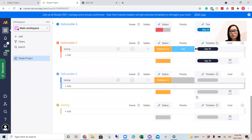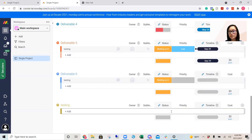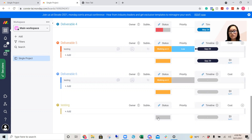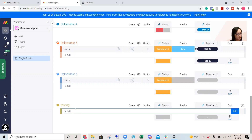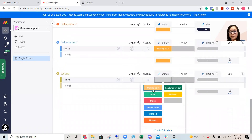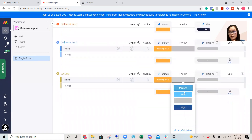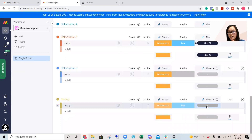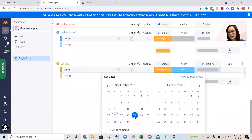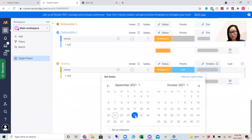So if you were to go to 'testing', for example, you need to put in the activity. Once this bar comes up, you can set its status — stuck, done, or working on it — and priority if you'd like to add that. And for the timeline, you need to set a date. So for example, the 24th — set dates, the 24th.